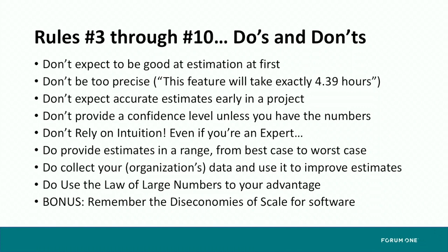Yeah. And I'm going to answer that question, and the answer is it's better to give a range. And within that range, you can actually use a little bit of math, it's not hard, to come up with an expected case. It's not a most optimal case, because you're going to define a best case and a worst case. And then you're going to pick a point in between that range. So 3 points. Actually, you're going to start with 4, and I'll talk about that in a minute.